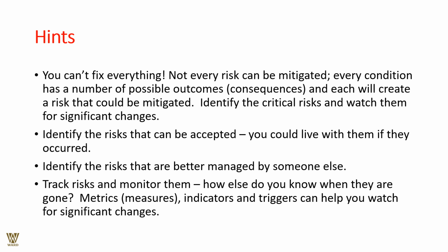Every condition has a number of possible outcomes, consequences I'm talking of, and each will create a risk that could be mitigated. Identify the critical risks and watch them for significant changes. Identify the risks that can be accepted, that you can live with if they occur. Identify the risks that are better managed by someone else.